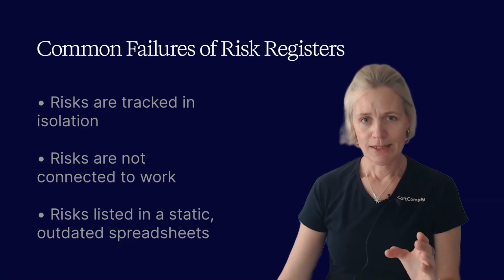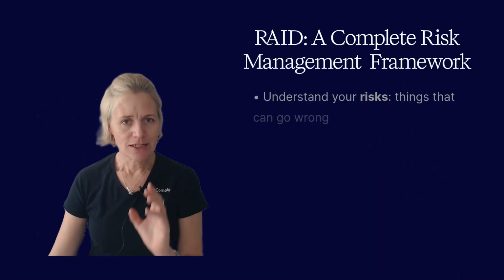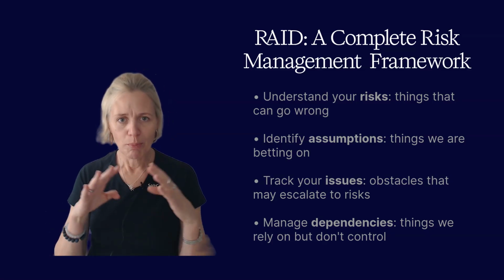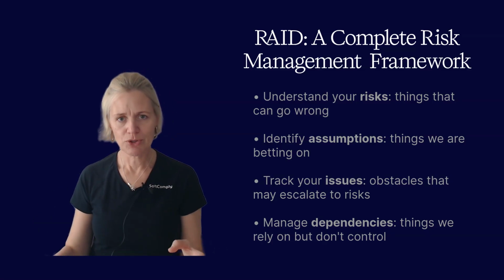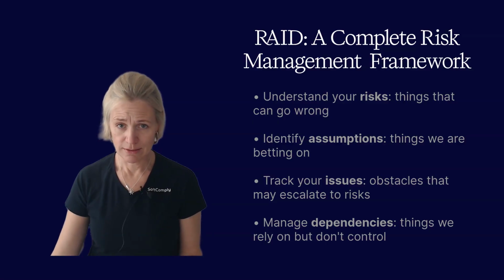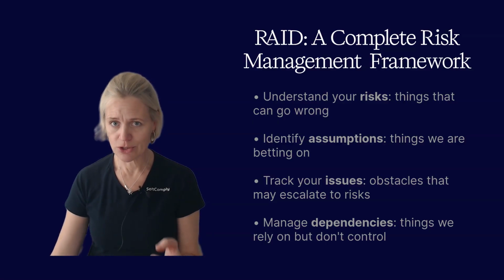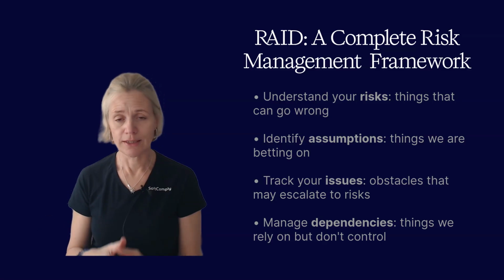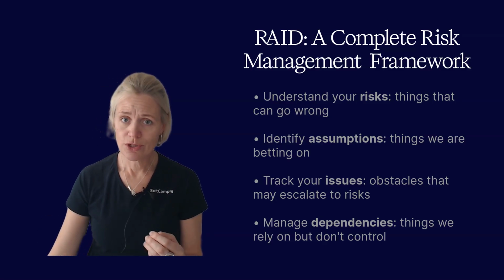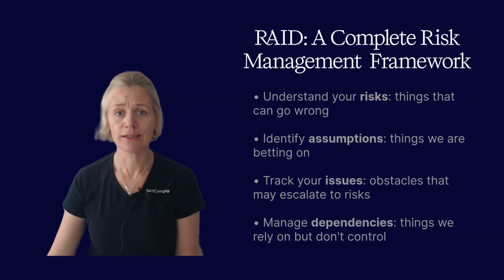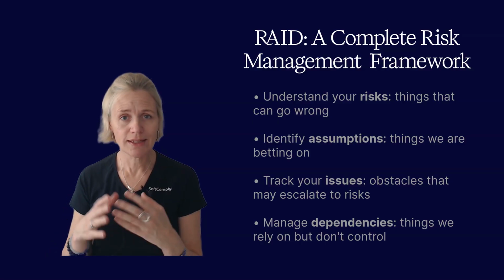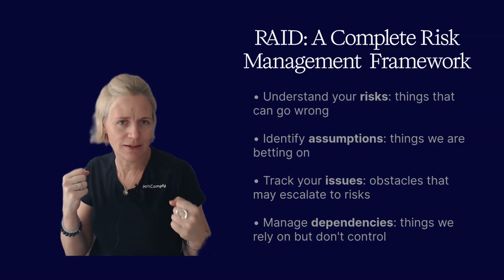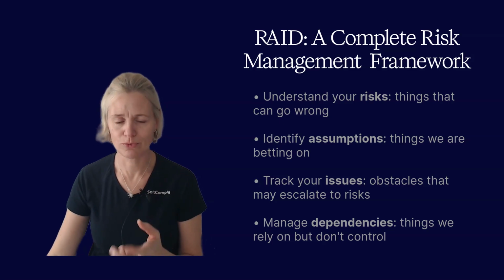And this is where RAID is often misunderstood. RAID is not a better spreadsheet or a more detailed risk log. It is a complete thinking framework that helps you understand your risks, things that might go wrong in your project or in your organization, assumptions, what we are betting on that everything will work, issues, obstacles that we're already having, and dependencies. What are the things we rely on but do not really control that gives us this, we will manage, we'll do, this project will succeed.